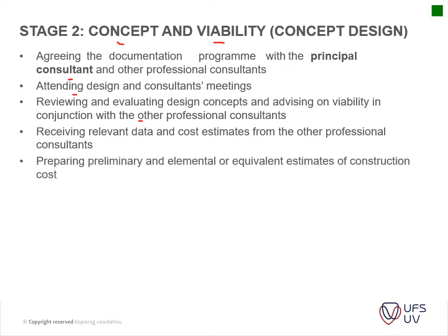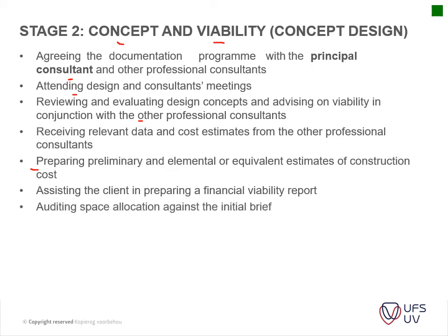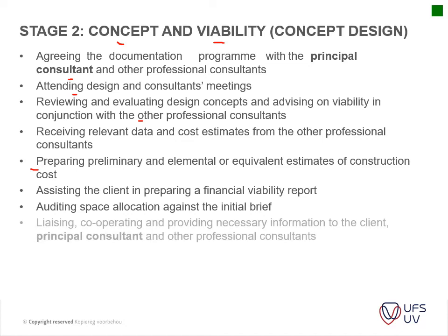Preparation of preliminary and elemental or equivalent estimations of the cost, depending on the availability of information. Assisting the client in preparing a financial report. Auditing space allocations against the initial brief. Is the occupation schedule from the client going to meet the requirements? If he wants a 30 key hotel, will his budget allow him to build a 30 key hotel or not?